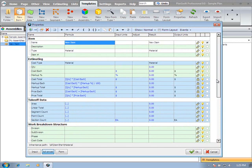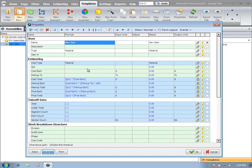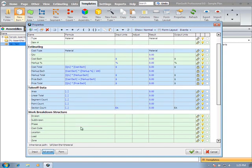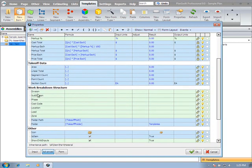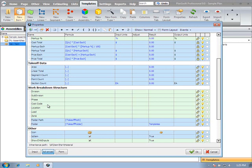For most users, you're primarily going to be concerned with the item name, the description, the item number, the quantity. That's where you're going to populate your quantity formula. Your cost each and your markup percentage. Then you have your work breakdown structure of division, subdivision, phase, cost code, location, load, and zone. Again, organizational properties that will transcend into your reports if you want to organize by any of those groupings.